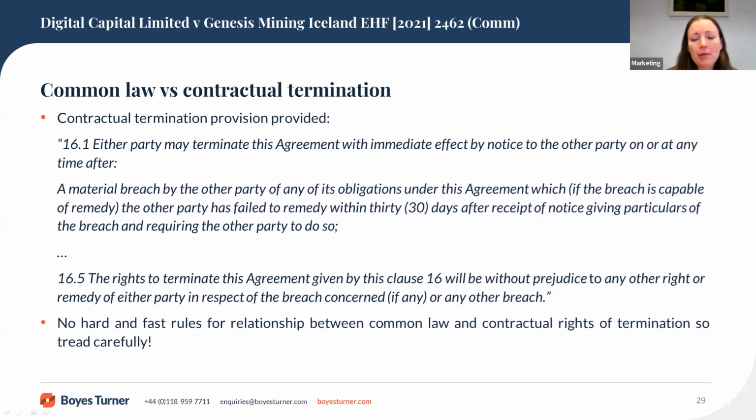The agreement in question contained the clause which I've put on the slide, which is seen in very similar terms in many contracts, which is essentially a right to terminate in respect of breaches, but with an opportunity to try to cure that breach. The clause went on in 16.5 to state that the right to terminate will be without prejudice to any other right or remedy.